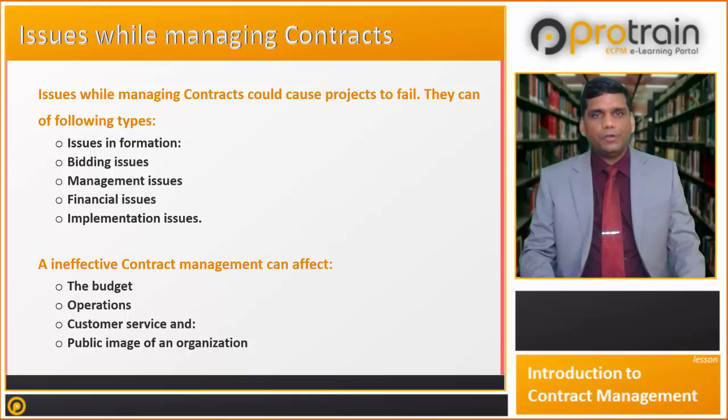Let us talk about financial issues. There may be delays in releasing of payments and delays in submitting performance guarantee and advance payment guarantee. Payment schedules may not be linked properly to the physical progress. This leads to front-loaded payments and the tendency to delay execution of the rest of the activities once the bulk of the contract has been paid. Therefore, all the payment schedules should be properly linked to the physical progress.